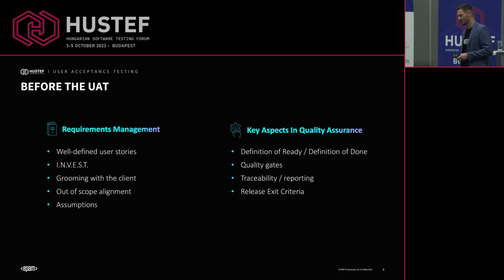Also, I would emphasize the involvement of the client as soon as possible, so not just in the end, because I guess you have experience with that in a negative way. And the last 2 points are based on my experience. So please always document the out of scope and the assumptions part as well, because it can initiate your discussions with the client, and also you will have the chance to initiate any action that can help you to avoid any big problems.